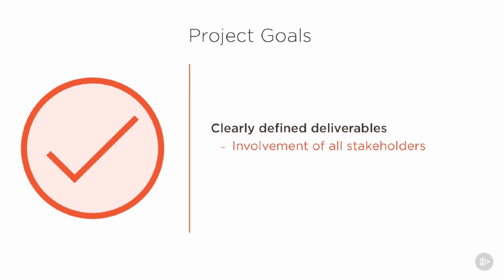In order to do this, we need to involve all of the stakeholders. A problem we often have is that project requirements were based on the needs of one group, and maybe that is the dominant group, but it did not consider the needs of the other parts of the organization that also interacted with this system. We see too often we develop a system for one purpose without looking at how that system interacts and is dependent on other systems. In many cases, we should not be just replacing a system. We should be building an architecture of many pieces that come together towards a common goal.